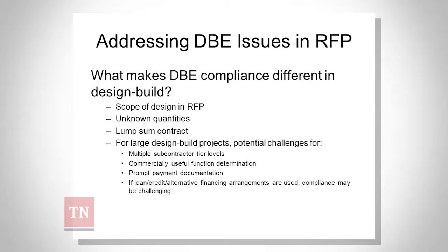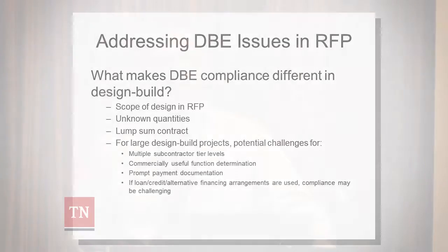What's the difference with DesignBuild? No quantities, right? No design. Minimal design. So if you're the contractor submitting a proposal, technical and price, how do you anticipate the use of DBEs will be done? How do you anticipate that'll affect your prices? That's the challenge with DesignBuild, both from the contractor's viewpoint and from the owner's standpoint.